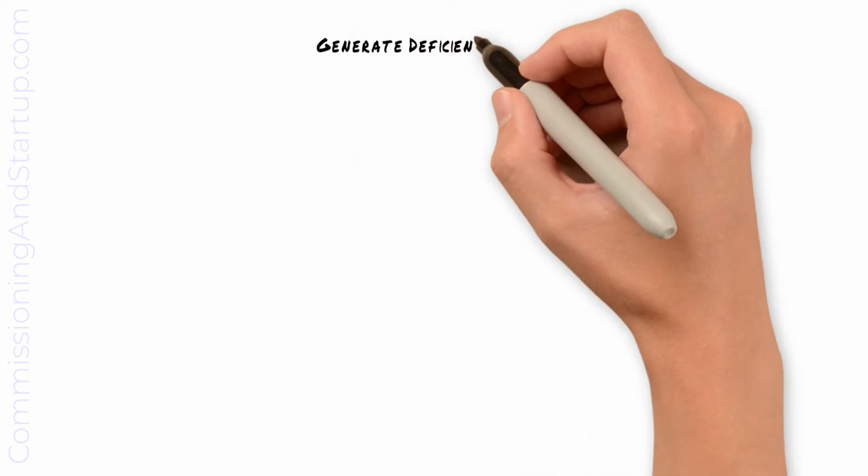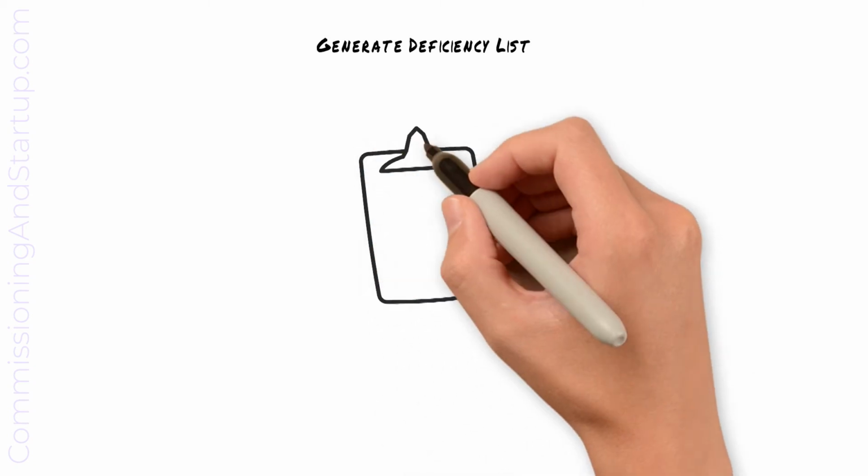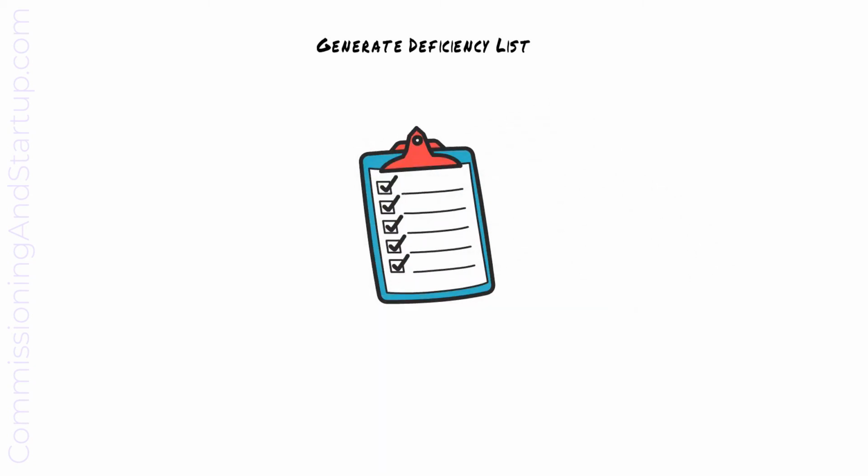Similar to previous stages, as deficiencies are identified, they are added to the deficiency punch list, categorized, and Type A deficiencies rectified. We now have equipment that has been verified and is ready for process or system startup.